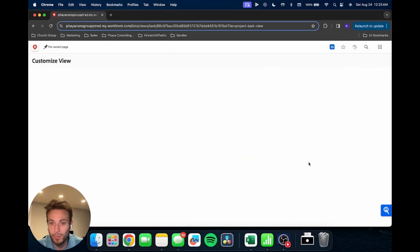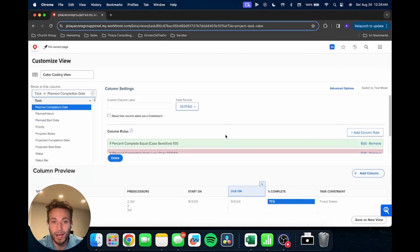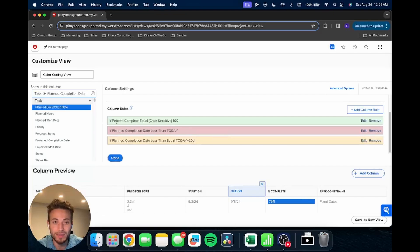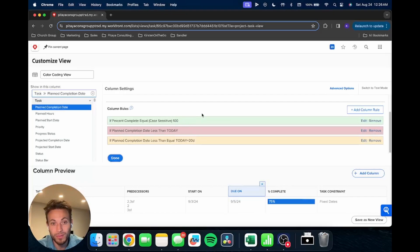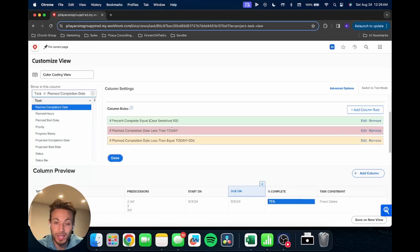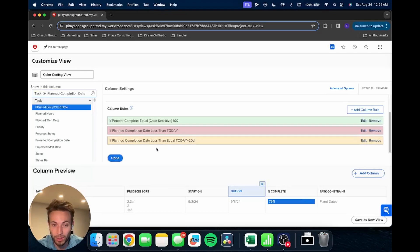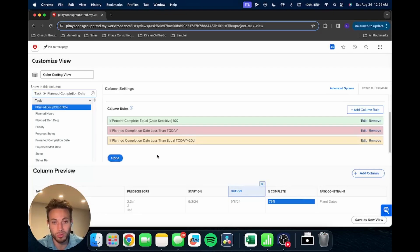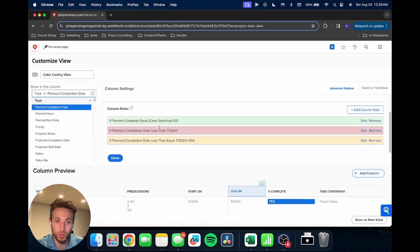So just to recap and go back in to explain that last little bit, what's happening here is, it's going down. So saying first, if it's complete, then we're going to mark it green. If not, move on to the next. Okay, then the due date is late. Then we'll mark it red. Okay, if it's not late, then if it's due within the next 20 days or one month, then mark it yellow. And then anything after that, there's no rule associated with it.